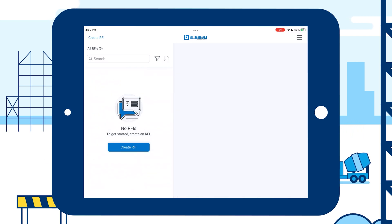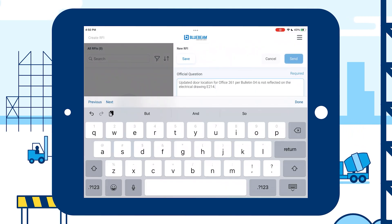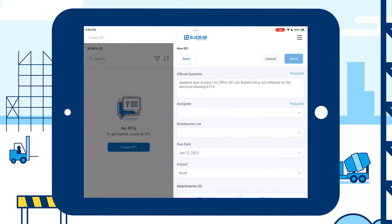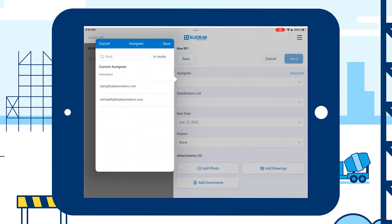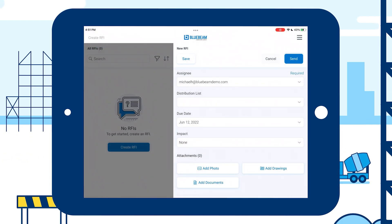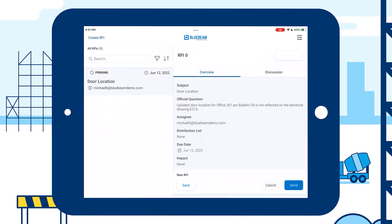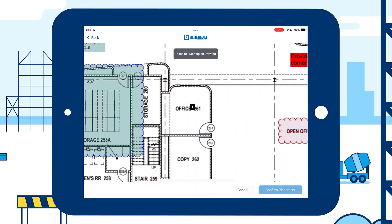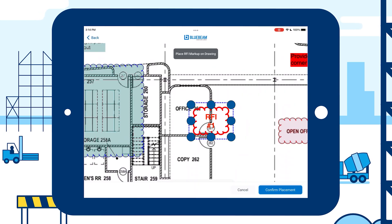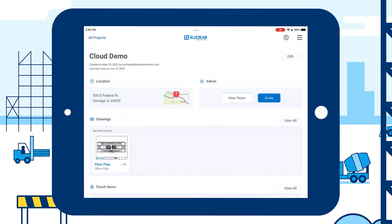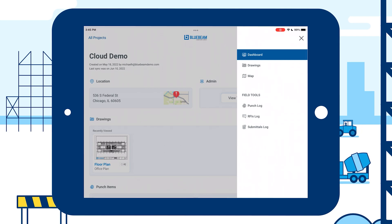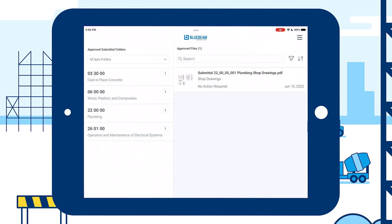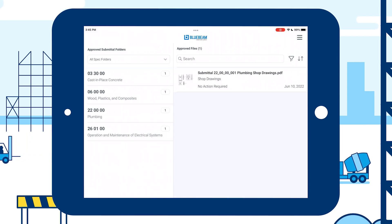For example, your field team can create an RFI through the mobile app and send it to your team in the trailer to complete it. Then, you can post the RFI response to the drawing and access it across devices. You can also ensure that everything was correctly installed based on project specifications by getting submittals approved on time. Streamline the process by assigning, managing, and tracking submittals across project stakeholders.